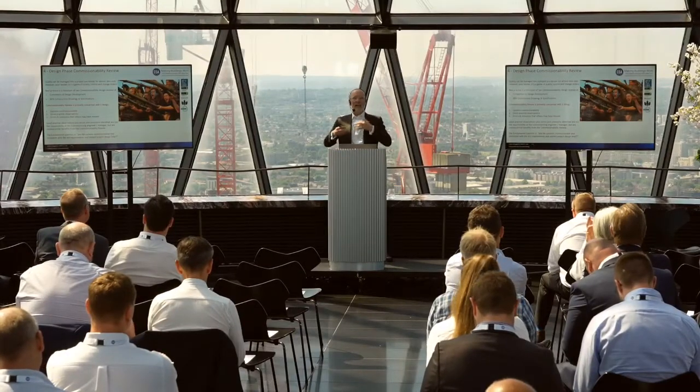Most people who do design commissionability reviews are not insured for design work. And this is not a first principles design review. This is a commissionability review, right? So the basic fundamental question is, does this system and all its components and all the things it interacts with, are they commissionable? Is everything there we need to test it and verify it? Will it operate properly? Is it consistent with the owner's project requirements and design brief, right? So that is the 80% of that review.